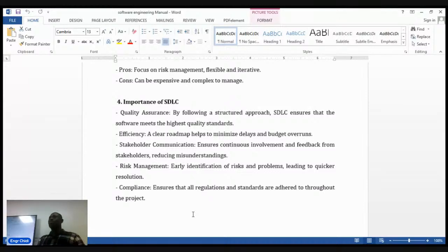Anybody that develops software will notice what I'm saying. You do software for somebody, and when you present it, they start telling you other things they didn't say before, and they expect it to be within the same budget. The only way out is, when you have gathered the requirements and done the design, take that design to them. Sir, is this what you want? He says yes, sign. You now hold it. Anytime they say they want something else, you say, sir, that's not what we agreed. This is what we signed. If you want me to do this second one, you pay me. And because it's signed, it becomes an agreement and is presentable in a court of law if it gets to that level.